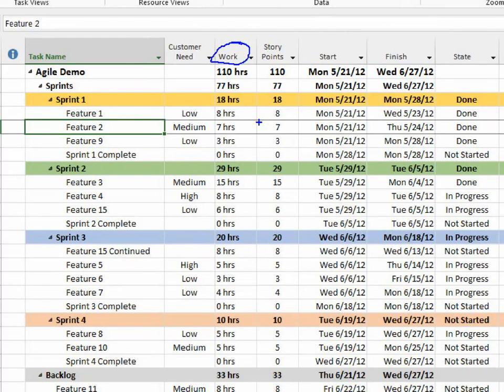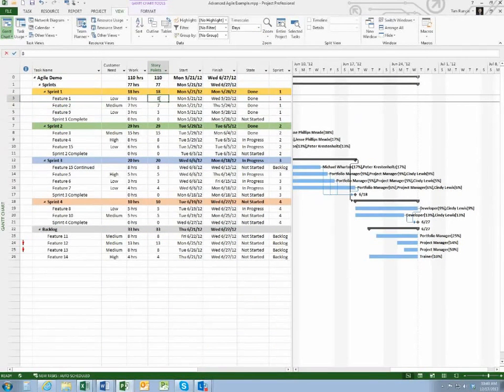And certainly from a management perspective, everybody wants to hold some accountability. So technical teams or development teams sometimes struggle with that. So organizations, in fact, if you think in terms of sprint, they'll talk about something called story points. And whether you call it story points or you have other flavors or names for this, the idea is that we're looking at the level of complexity. And the complexity behind delivering a feature or a user story or a task or a deliverable is that we're trying to figure out how much time will that take. Usually that does have some correlation which it might tie back into hours. So I might see that there might be a one-for-one correlation early on between my hours, and then certainly I might have a variation between that.